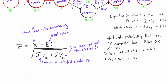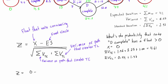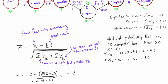Now we fill in the equation. Z equals 0 minus our event slack — which is 24.2 minus 20, so that's 4.2 — all divided by the square root of 4.61 plus 1.8. Simplifying, we get negative 4.2 over the square root of 6.41. Punching that into a calculator gives a z-score of negative 1.66.